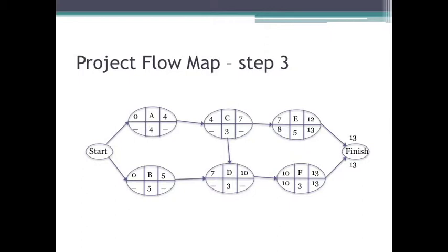We go on. For task D, well, task D is the predecessor to task F. So task F's latest start time becomes task D's latest finish time. So that 10 weeks, that's task F's latest start time. This becomes the latest finish time for task D.